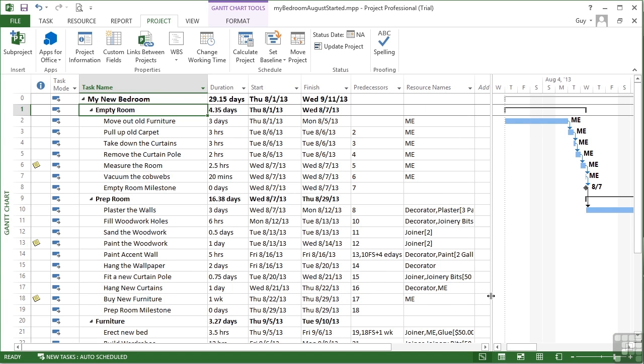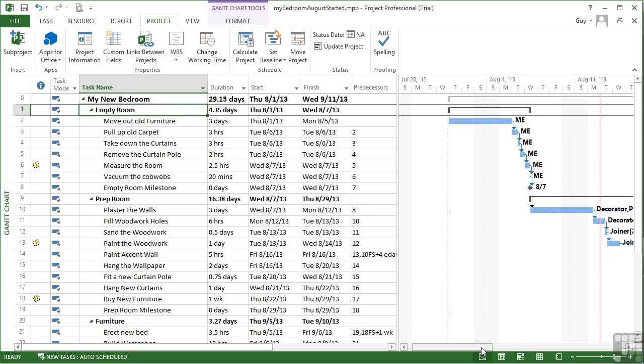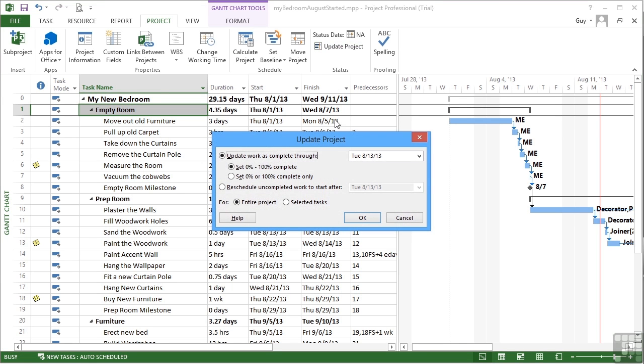So we can see that we have moved much further on in time, and it's about time we updated our project. A quick way of updating multiple tasks in this case would be to go to the project ribbon, update project, and we'll say update the work as complete through to August the 13th, 100% complete.